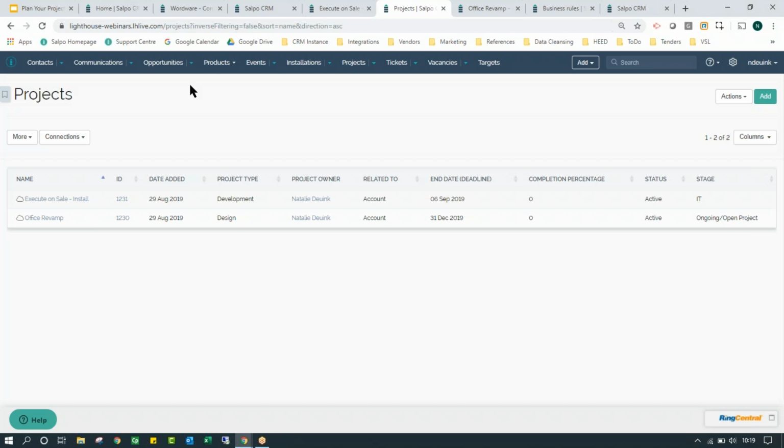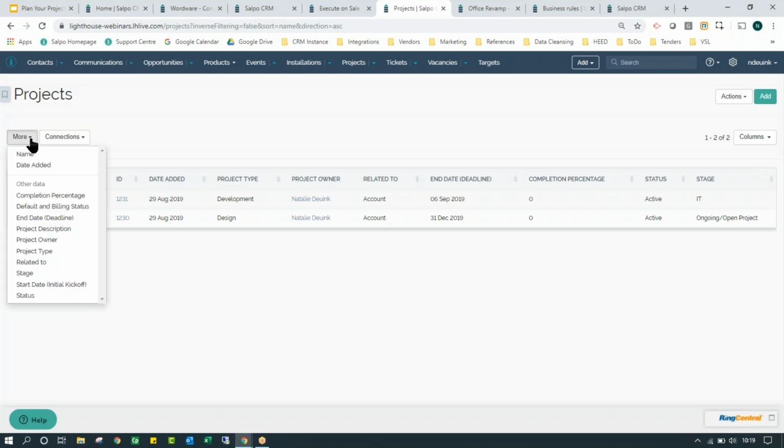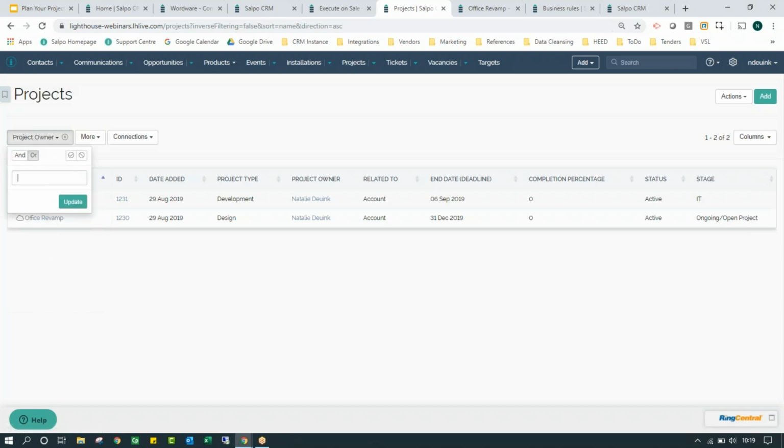Let's say you have a ton of projects listed here, as well as those milestones and dependencies, and you need to start filtering it because you want to look at a specific project owner. You really want to see, well, what's Natalie got going on right now? We've got this new project coming in that we've just won. I want to see where she's at with all of her projects because I need to start looking at resource allocation. I can start applying these different drop-downs and saying, show me everything where the project owner is Natalie. So we can start applying some of these filters.